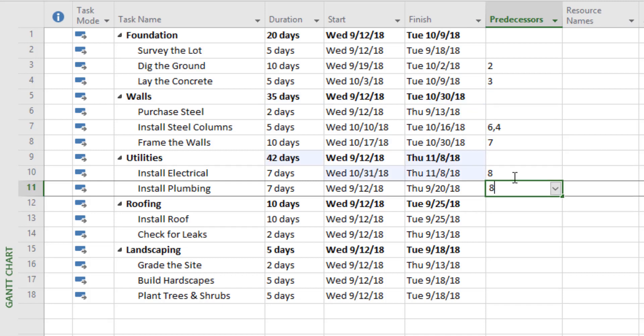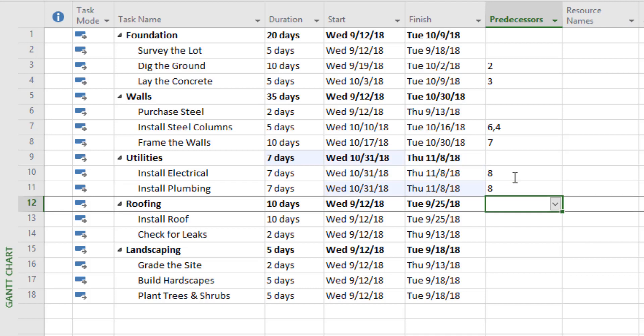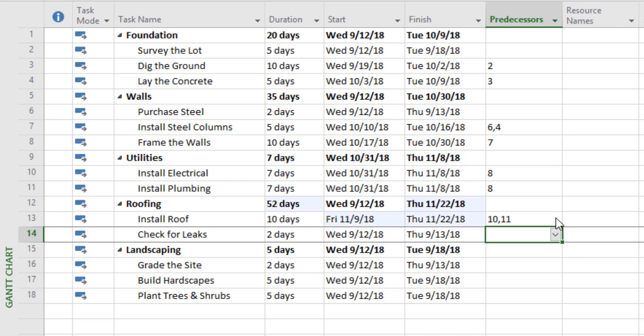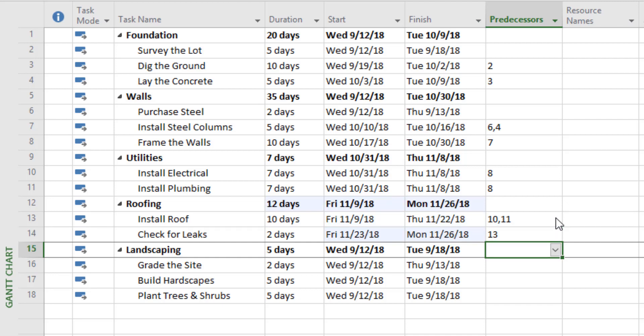We frame the walls and then we can install those utilities. For roofing, we've got two predecessors: number ten, installing the electrical, and number eleven, installing the plumbing. And to check for leaks, we have to install the roof first, so that predecessor is number thirteen.